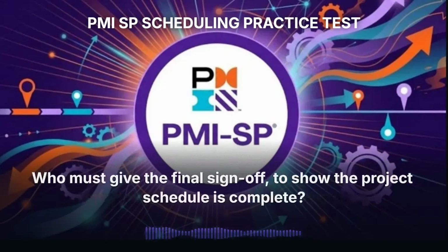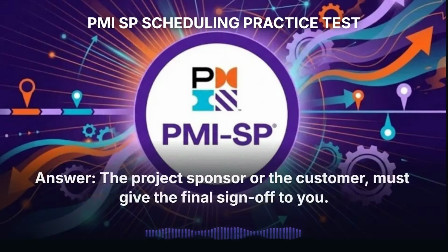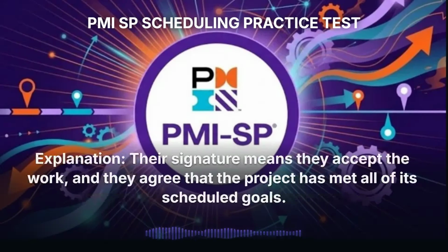7. Who must give the final sign-off to show the project schedule is complete? The project sponsor or the customer must give the final sign-off to you. Their signature means they accept the work, and they agree that the project has met all of its scheduled goals.